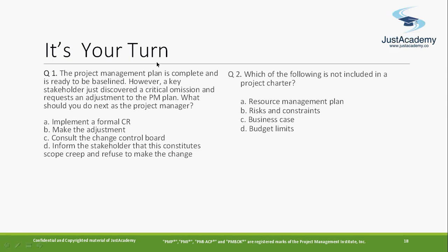So the first line of the statement itself says the project plan is complete and ready to be baselined. When I say ready to be baselined, ready to be finalized, it has not been finalized. They are in the planning process group. A change request comes after the execution, right? You do the execution, you do the monitoring, and at that moment the changes come, right? So there is no change request. You're in the phase of finalizing the plan, in the planning phase. You are about to finalize it. You have not done it. This word itself, I tell you, is very important.